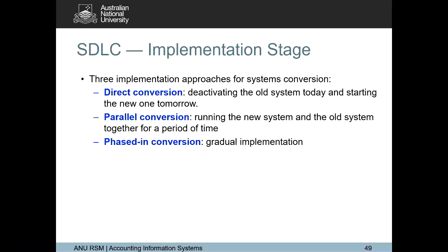So phase-in is gradual implementation. Parallel conversion is when you're running 2 systems at one time, and it costs the company because of the migration of data. If some of them refuse to go into the new system and keep going to the old system, the migration will continue and continue. We have to go and ask, how long are you going to use this? It's time for you to move on, all right?